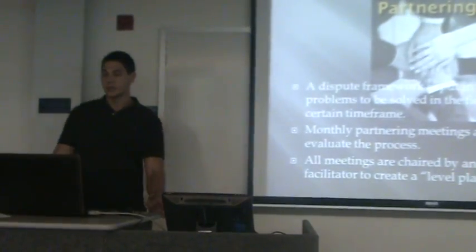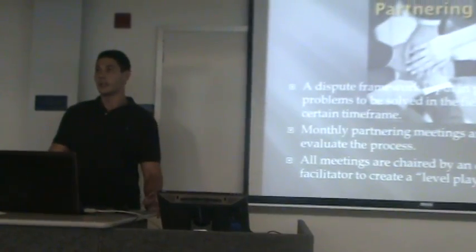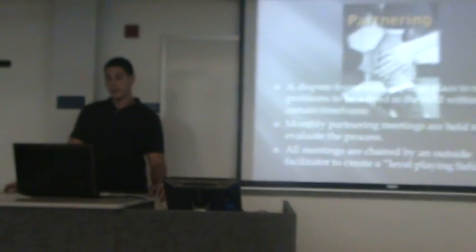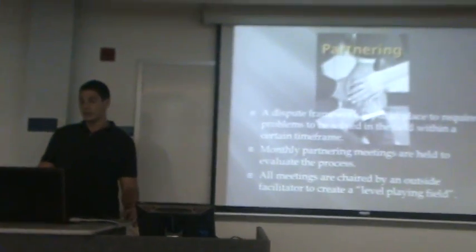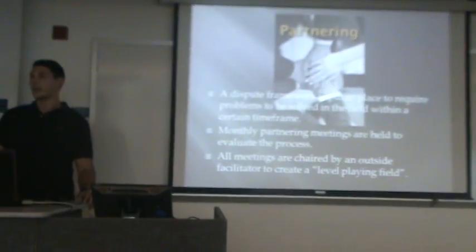A dispute framework is also laid in place before the project even starts during partnering. Monthly partnering meetings are held to evaluate the process. All meetings are chaired by an outside facilitator to create a level playing field.